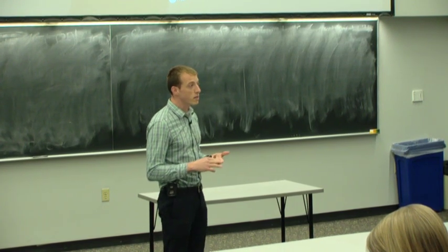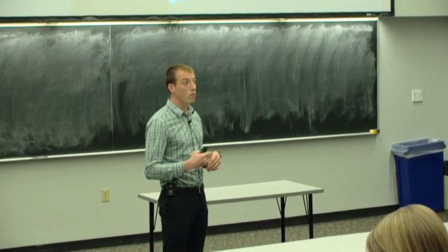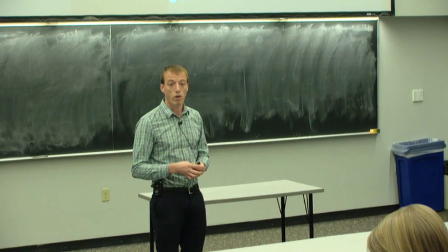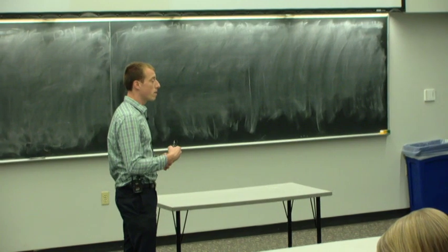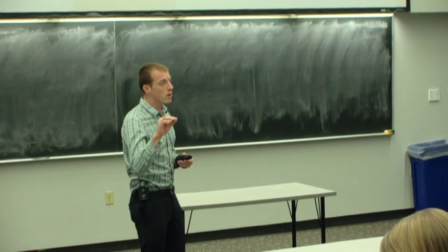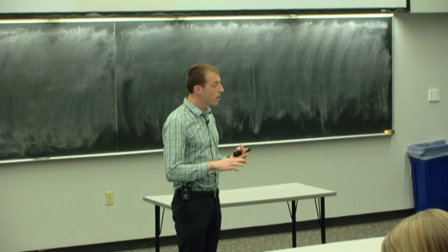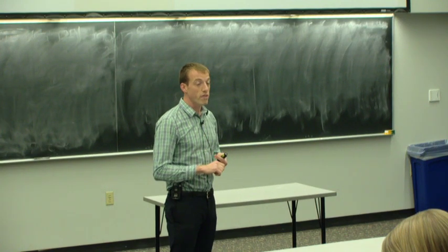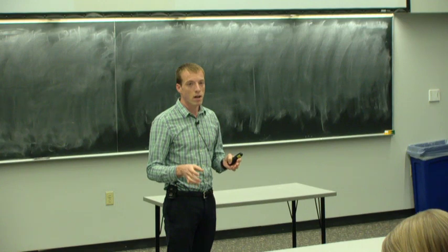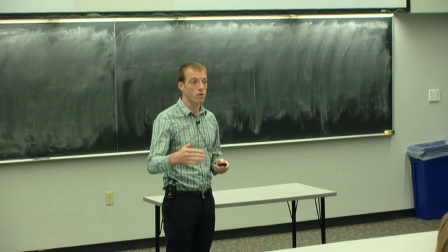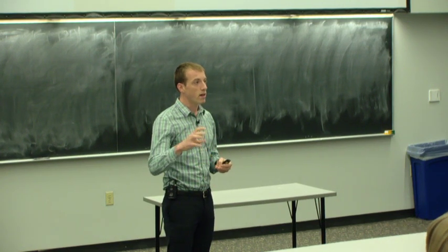So when you multiply these three together, the higher score you have, the more concerning that issue would be, and the more you'll want to do to address it and make sure that you try and reduce that number. So you'll usually go through, assign all of these severity, occurrence, and detection numbers without any kind of control on them, like you didn't do anything to account for it.